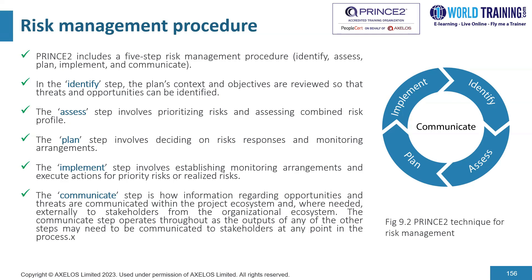Then we Assess — this is where we prioritize risks and assess the combined risk profile. Then we Plan, where we decide on risk responses and monitoring arrangements. Then we Implement, where we monitor arrangements and execute actions for priority risks or realized risks. And finally, we Communicate — this is where we look into how information regarding opportunities and threats are communicated within the project ecosystem and, where needed, externally to stakeholders from the organization's ecosystem.